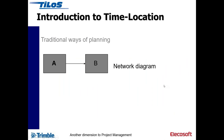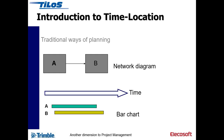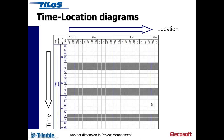Traditionally you might be using various tools — P6, Power Project, Microsoft Project — where you've got activities linked together with logic links and viewed in a network diagram without a time scale. But everybody conveys that by displaying it against the time scale, giving you the bar chart, the Gantt chart. If you're working on a linear project, you've got an extra dimension to play with: time and distance location.